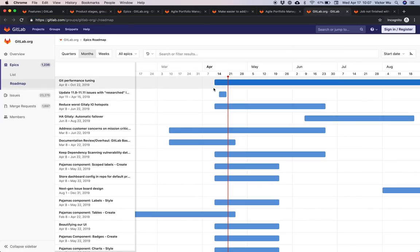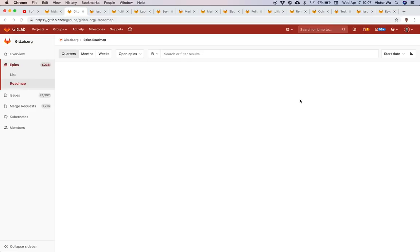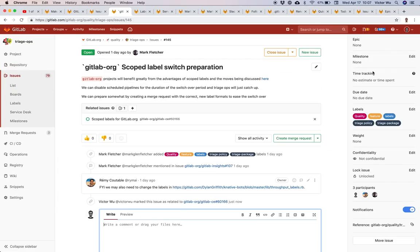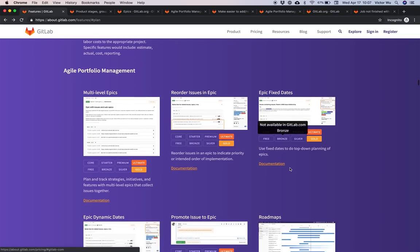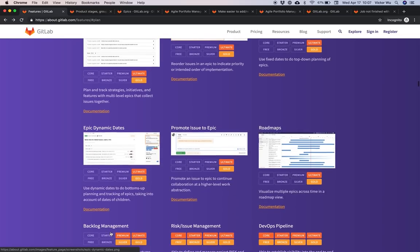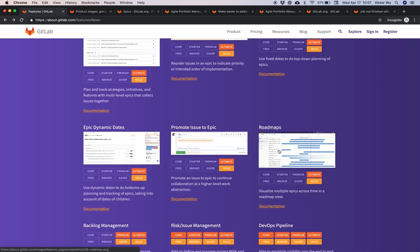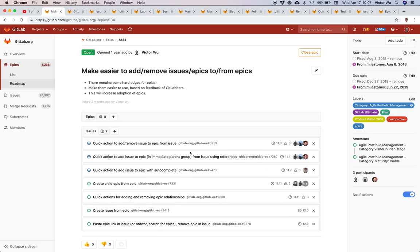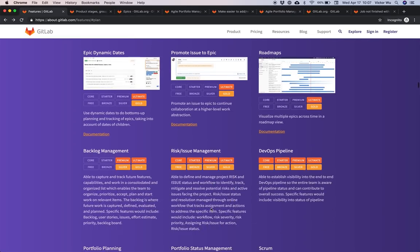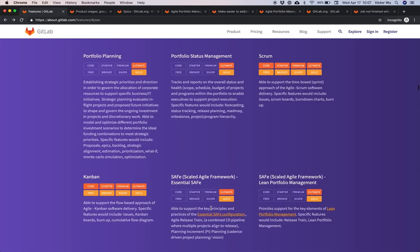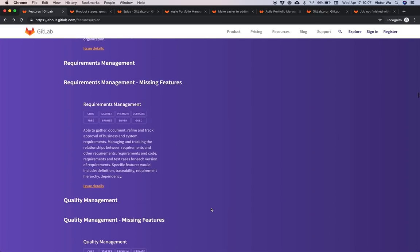The start and end dates of a given epic depend on these dynamic values and will be reflected on the roadmap. You can also promote an issue to an epic — similar to moving an issue, it takes all the information including title and description, closes the issue, and creates a new epic. So if you're working on an issue and want it to become an epic, you can do that. That wraps up the epics section.